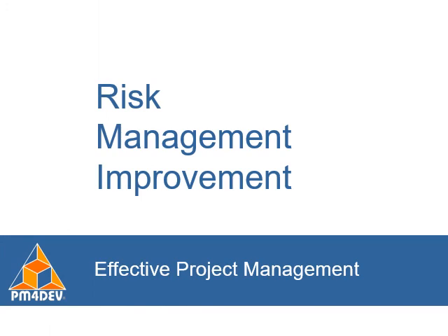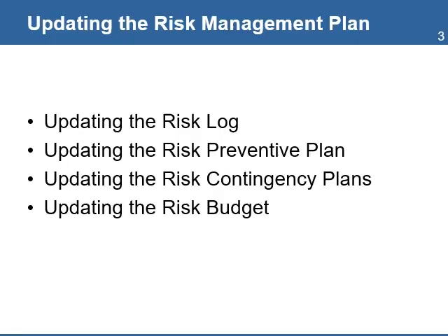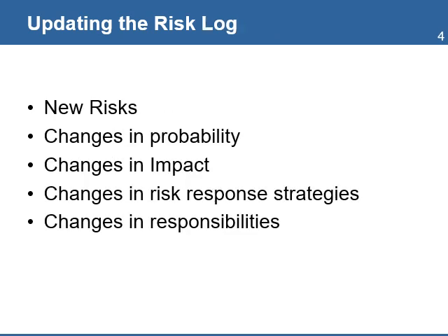Risk Management Improvement. Once you have the recommendations from the Risk Plan Evaluation or Risk Audit, you can update the Risk Management Plan. This includes updates to the risk log, the risk preventing plans, the risk contingency plans, and the risk budget. The discovery of new risk or changes to the levels of impact and probability requires an update to